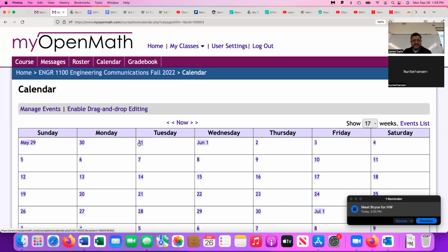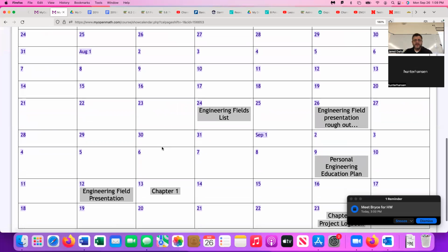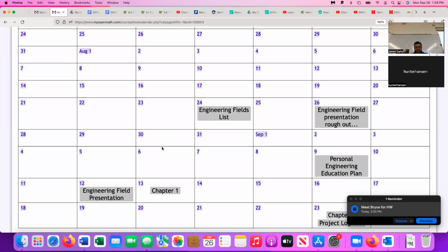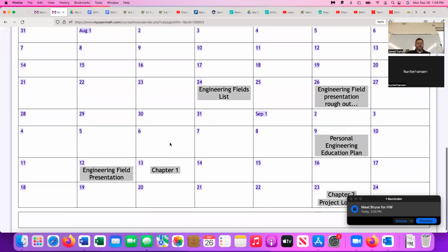And then after the task list is complete, you're going to go ahead and you're going to calculate the expected time to complete those tasks. And there's a formula for that that's in the video. And it's a pretty simple formula where you estimate how long you think it'll take. You estimate an optimistic and a pessimistic time for the amount of time you think it would take, put them in the formula, calculate.